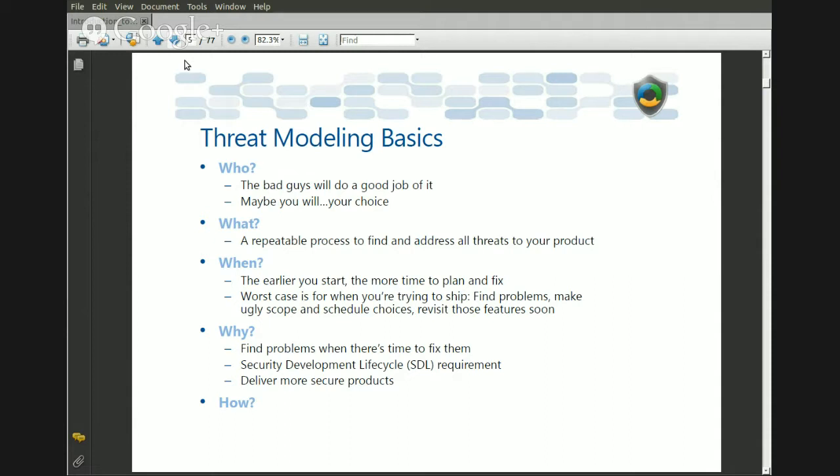Day 40 is better than day 300, because on day 300 we're probably getting ready to almost ship off the product. We're in testing, or we have low rate initial production, where you're actually putting out some version of the product on the market. But now you know that you have these issues, and you have to go all the way back to maybe day 100 to fix them.